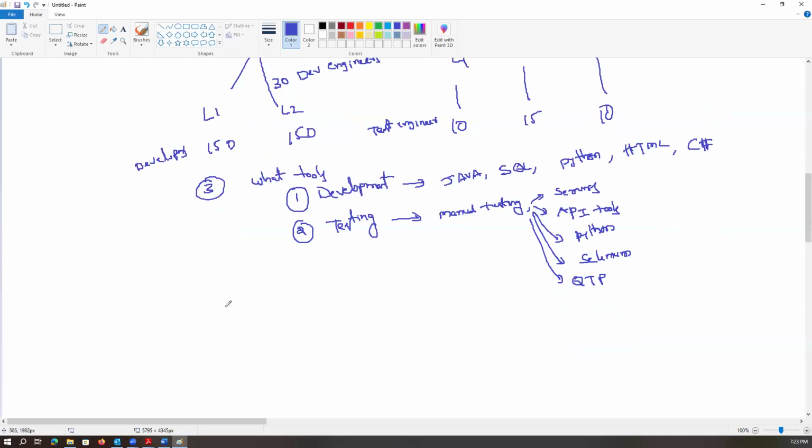Okay. And here, like coding. So first coding has to complete. To write all this coding, they decided coding has to start in the month of February 2024, and it has to complete in October 2024. Because at least to testers, we have to give some time, 1 year time, to test each and everything. Okay, coding. And then testing.